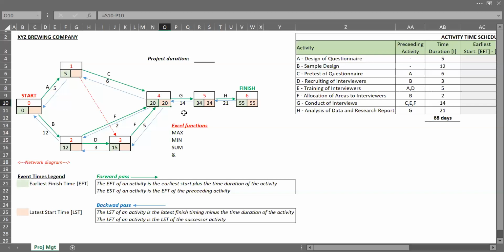All right. So this arrow flows solely to event number 1, which means that we can do the same way to calculate the latest starting time, which is the same thing as equal to 20 minus 6. Press the enter key. So we have 14.